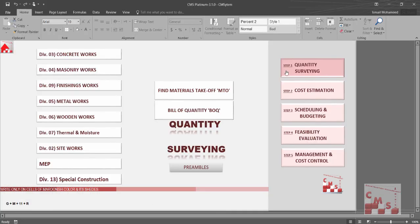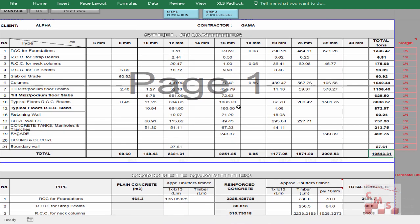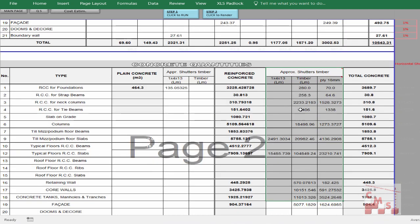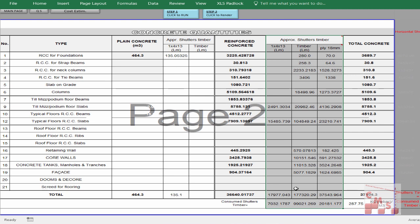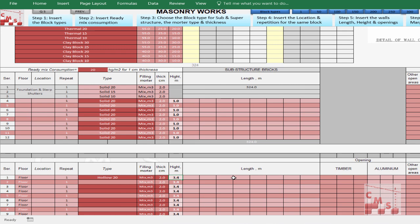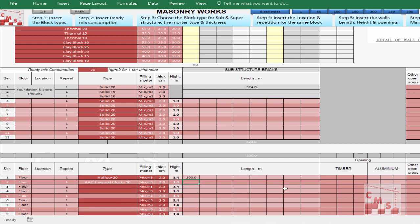CMS provides directly the number of ribs, solid parts required, and number of hollow blocks required for this kind of slab, plus all the detailed quantities of concrete and required blocks — all coming automatically. When you continue, all data produced from quantity surveying is reflected directly in the material takeoff. You can see all types of concrete, all rebar per diameter, detailed quantity for each member, total quantity required per element and per diameter for the full project.